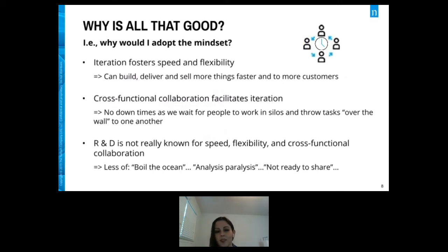Also, collaboration. I mentioned that Agile is a collaboration framework. Collaboration helps you work fast too. For example, contrasting it with the old way of building something as a team together. Let's say there were a bunch of data scientists in our little, hip place in the office building a product. We think it's great, and then to implement it, you have to send it over to the application development team, let's say. You throw it over the wall to them, and then they take some more time to build it, but they might build it in a way that doesn't align with your expectations. They might run into difficulties implementing the code as you wrote it. And so if you wait until the thing is finished to collaborate